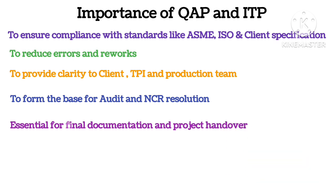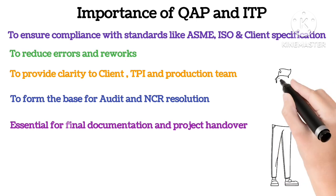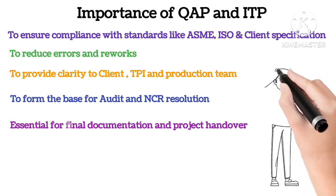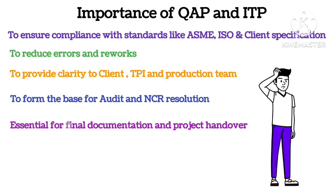Let's say you are fabricating a pressure vessel without an ITP. How will you track whether welds are inspected by RT or UT, or whether PMI is required before or after welding? Hence, the ITP and QAP are very crucial documents.